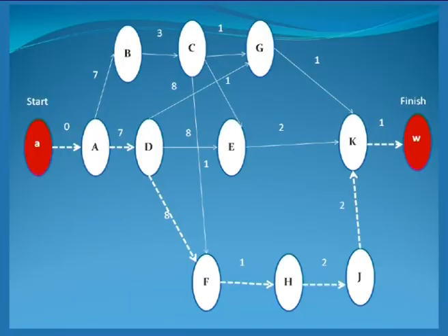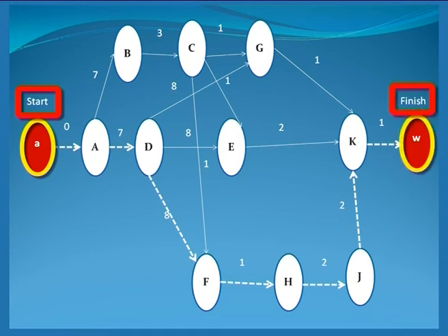The minimum duration of the project will be the length of the longest path between the initial stage and the final stage. This is shown with the darker line in the figure. If we delay any work in this path, we delay the project finish time. That means delay in performing any of these tasks in the path causes delay in the time required to finish the project, and for these reasons this path is known as the critical path.